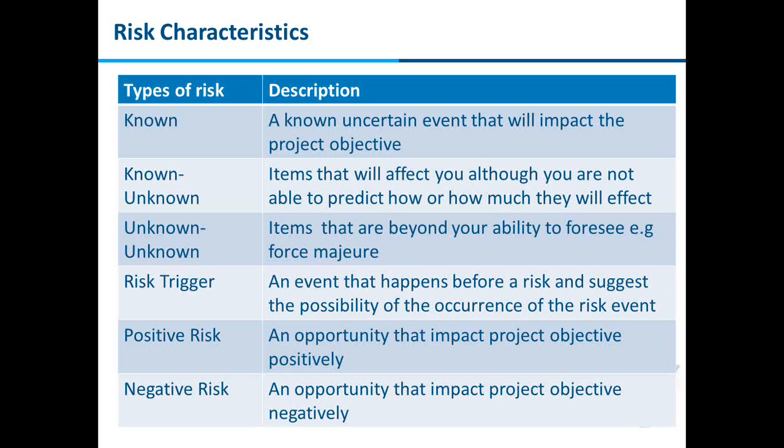As a project manager, you need to work on this and be ready with the contingency plan or the proper response. What I normally do for HR and resource management is ensure that the team members working with me are listed down. I have their leave plan and their leave history. This is the proactiveness we can do. But other than that, an emergency, you cannot calculate.